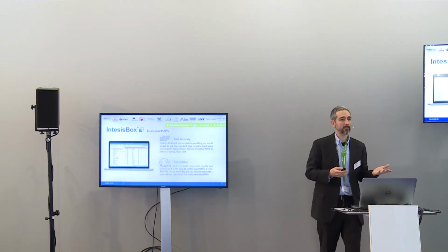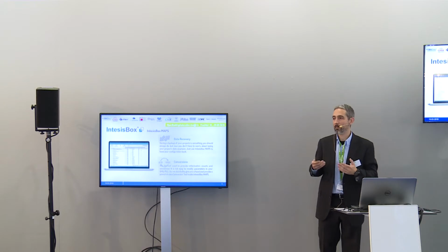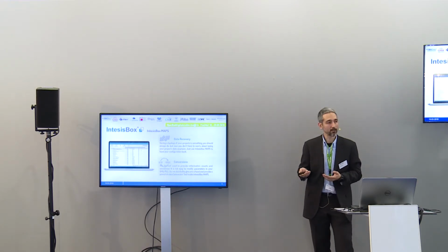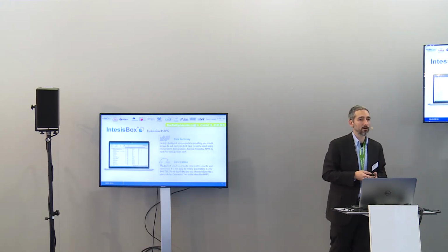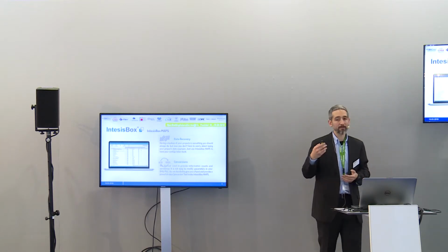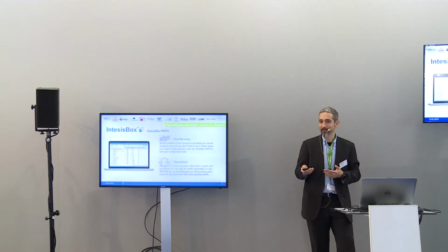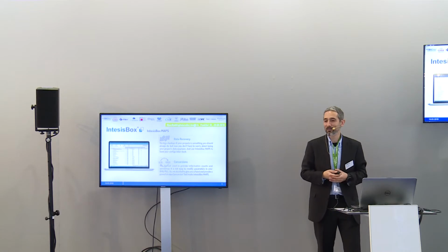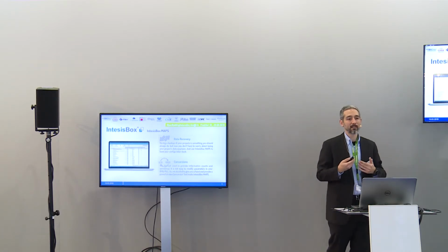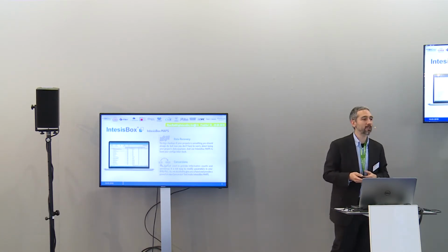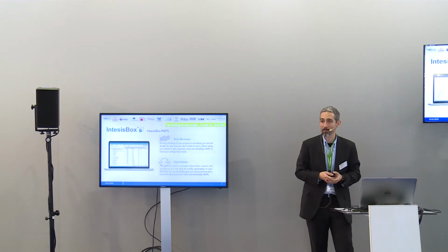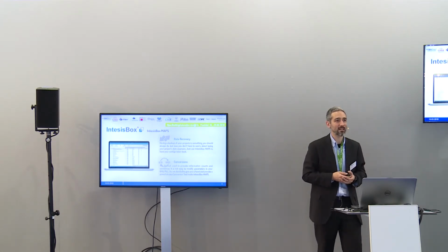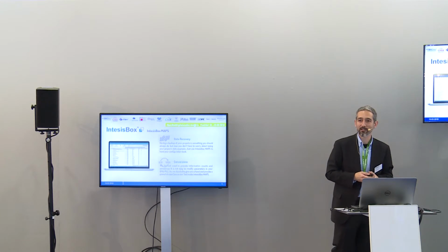This is also important in some protocols, like BACnet, where some of the configuration may be changed online while the box is running. So in case someone has changed some of the parameters during the normal working mode of the box, you will recover the current ones at the moment, not the parameters that you set when commissioning the box. This is a bit tricky sometimes when you try to find out what's going on, but you have no clue.